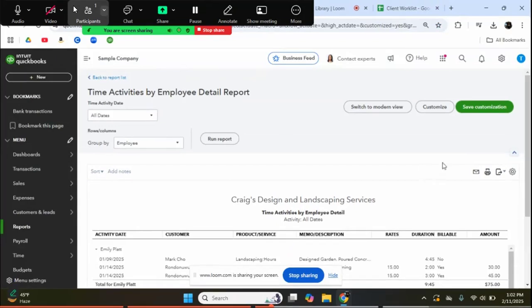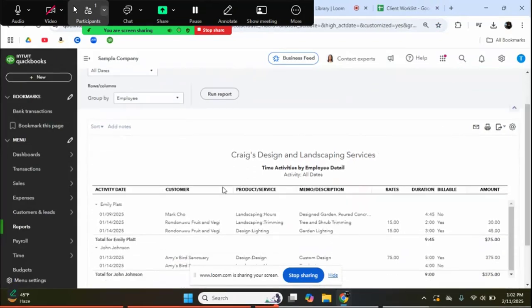You would pull that in QuickBooks and it would show the customer, the employee, and the amount of time that they're spending. Then these would be the memo items, the things that are related to your client work list, and you would look and see how much time they are actually spending, and is that within the estimate that you made for that client work. Okay.